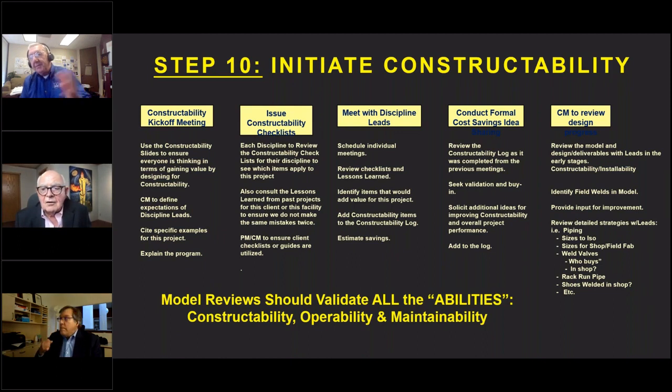This is another slide on what we do to initiate constructability. We have a formal process for doing that. I'm not going to go through it all, but the big steps: we have a kickoff, we have our checklist that we use, we meet with the discipline leads, and we meet with the construction guys. We discuss which items on the checklist are really going to add value for this particular project. Then we look for cost saving ideas.